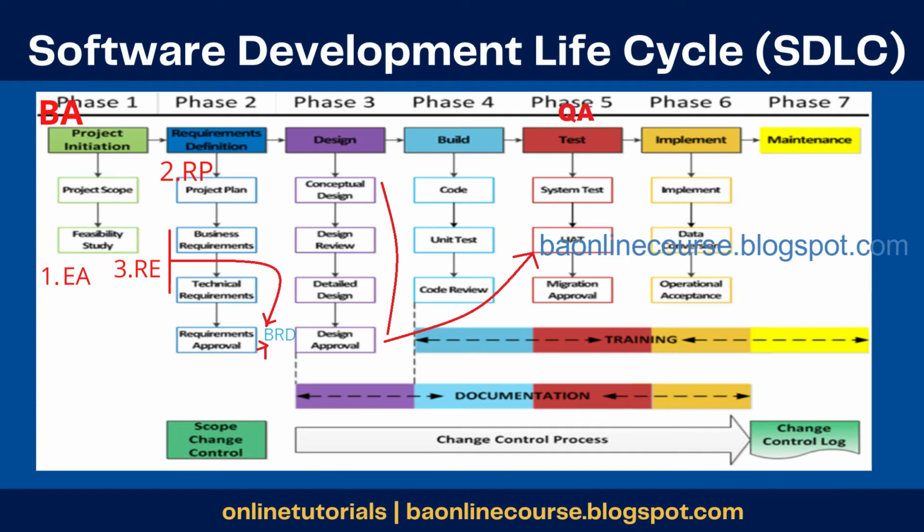Okay. So let's say you've started doing the UAT and there are 1,000 test cases. In those 1,000 test cases, you identify, let's say, 20 defects. Those 20 defects are sent to the design and development team. They would fix those 20 defects and then release a new version, which would have all those fixes applied to it.